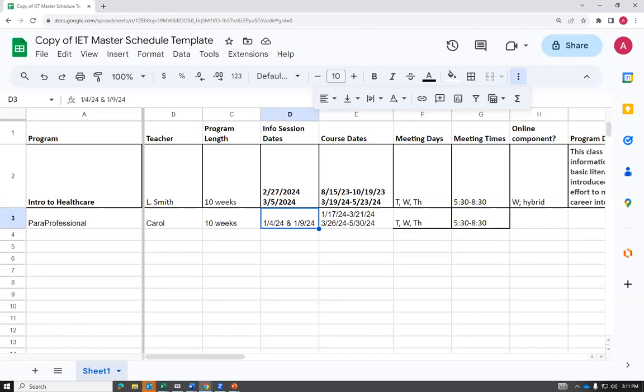10 weeks is really a sweet spot for us, where we can run 2 IETs in the semester, like I mentioned before. 15 weeks kind of just allows for one. The other side to this is having a program that's just long enough to ensure that the students make it to the finish line, because we know the longer we make the program, the more chances exist of student lives getting complicated and having to pause out.